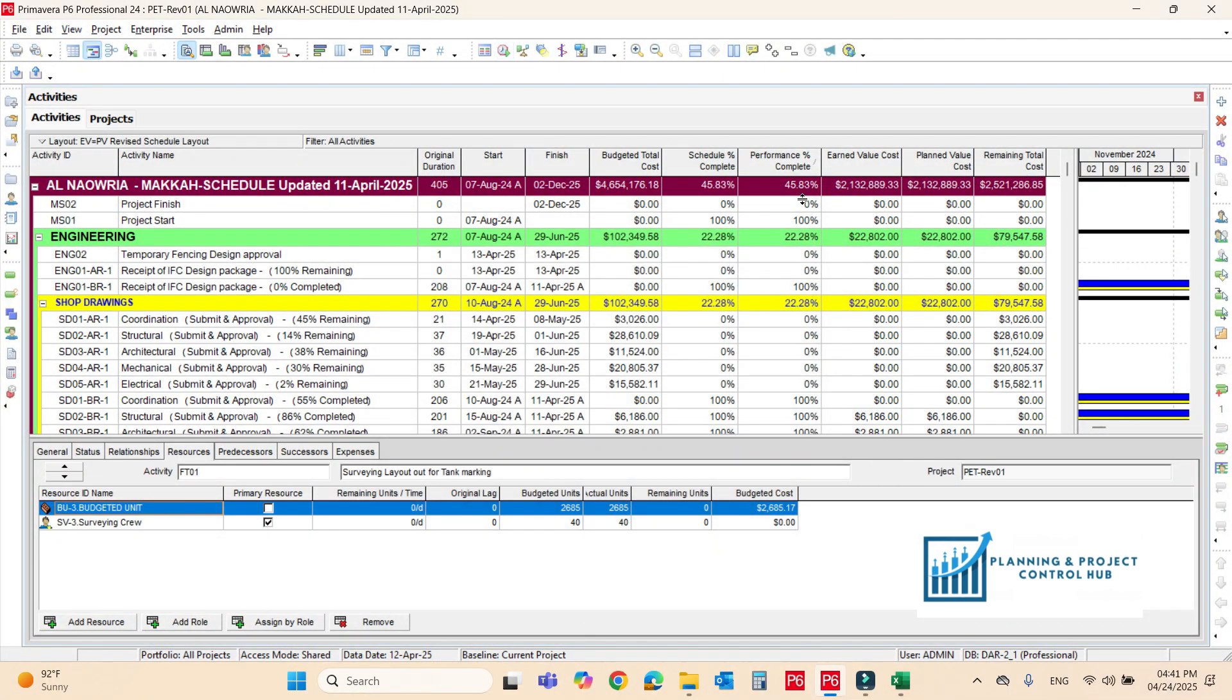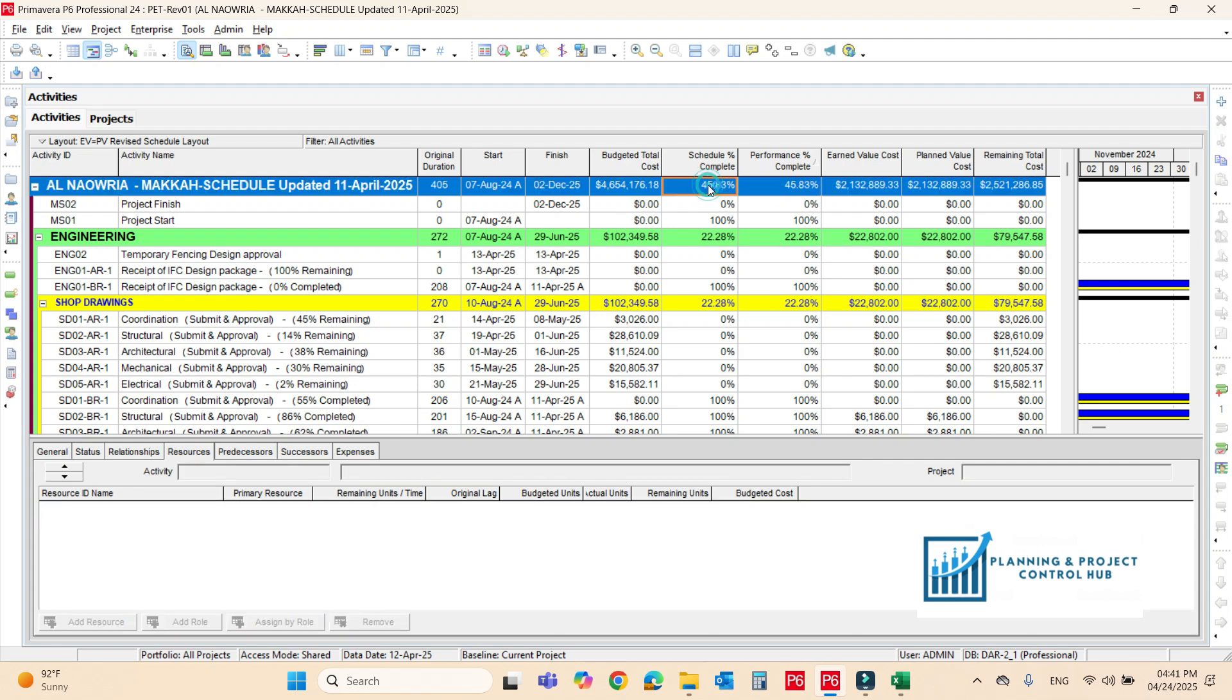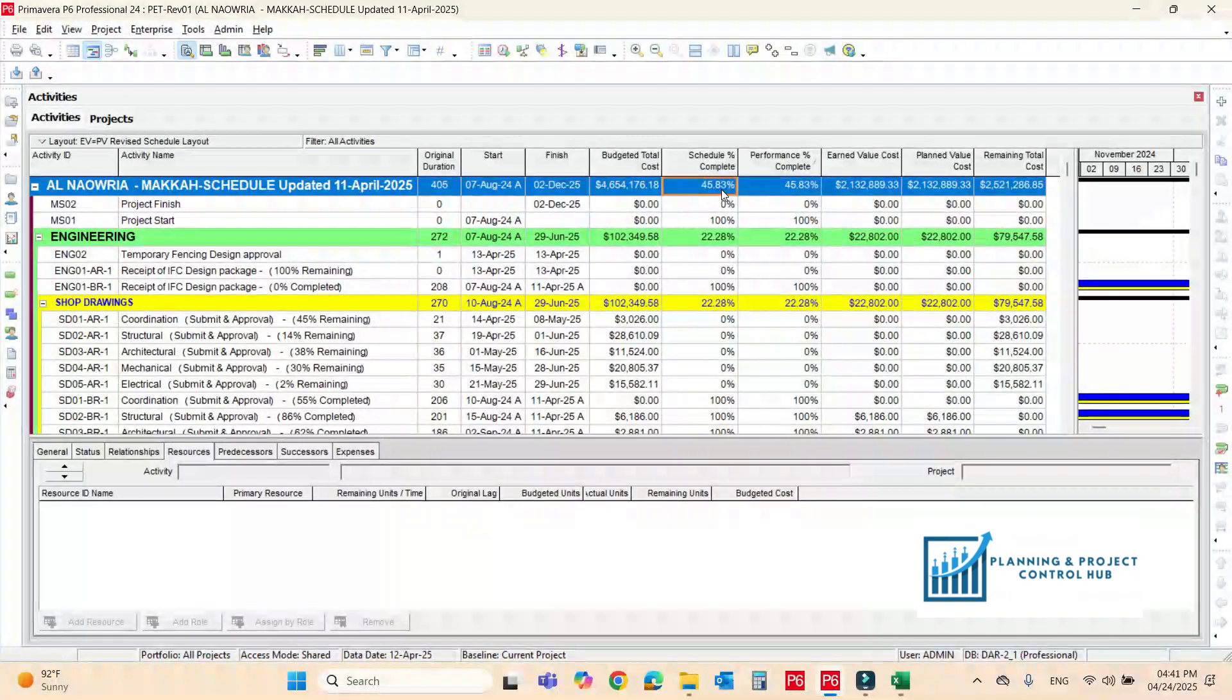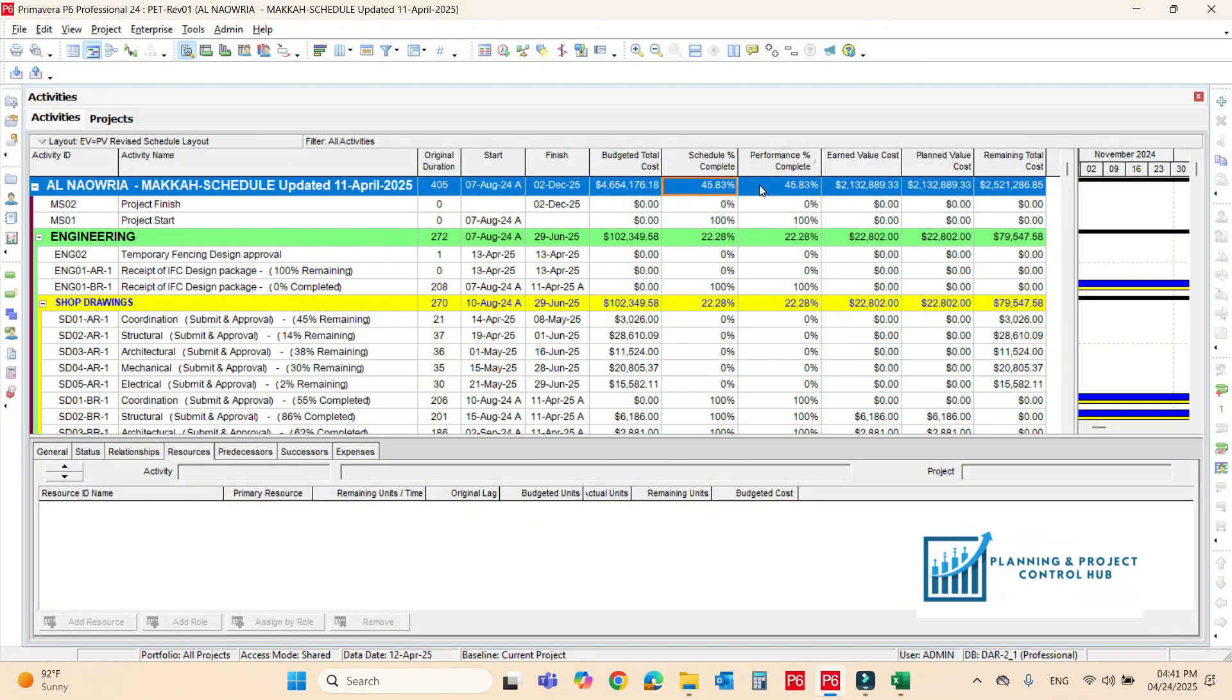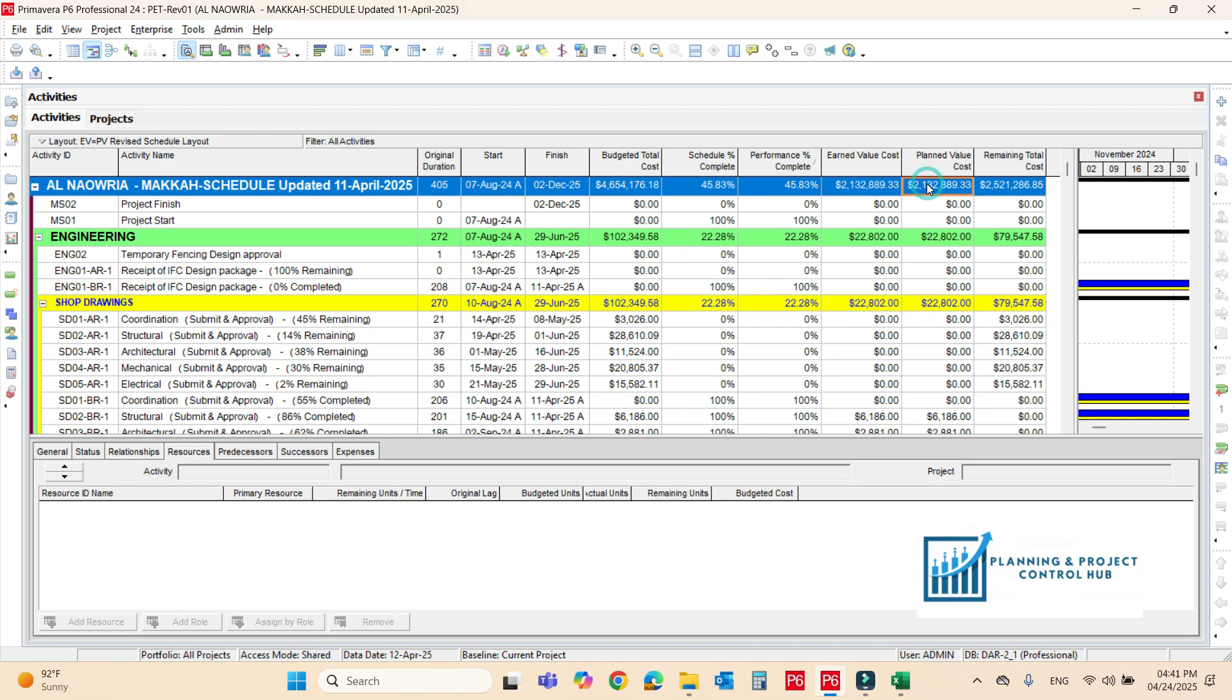Why not we make it now. We have to change the data date again, something different. Now schedule it. Now you check it here. Here we go all the things verify and good. You see here the schedule percent complete is 45.83 and the function complete is 45.83 and the same is for the earned value, it is both the same.